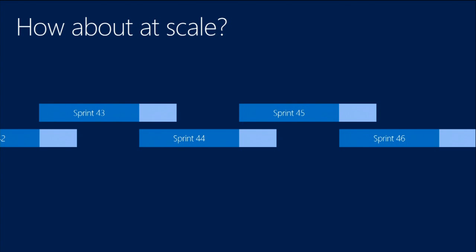How do we handle testing? And the answer is, every team has their own test members, and the testing is done within the sprint. So the healthier teams, the testers are actually working with the developers and getting pieces to test quite quickly, almost like maybe within even 3 days within the sprint. They might get a stubbed out API that they could write their automation test framework against. And they're actually working and testing throughout the whole thing. And then really the last 3 days is kind of like, okay, no more coding, we're just kind of verifying everything. The teams that I would say are a little less healthy, they actually have a little mini waterfall in their sprint where all the coding gets done here, there's a little code complete date, then all the testing gets done here. But regardless of how they do it, the idea is the testing's done within the sprint. It's completed within the sprint. So, okay?